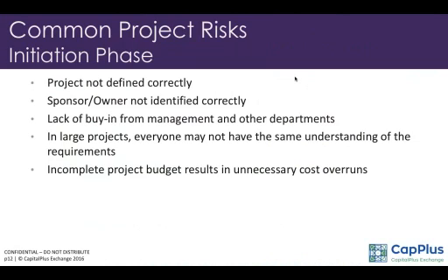In a large project, everyone may not have the same understanding of the requirements. There will be specialized areas, so this also is another risk that needs to be managed. Project budget, a lot of people start doing the budget after they start the project. This has to be done long before you start the project, and you need to get management commitment saying that, look, this is the amount that you have allocated. It looks like we need much more than that. Do we start the project, or don't we start the project? Or do we scale down? These types of decisions can be made if you have a proper project budget.